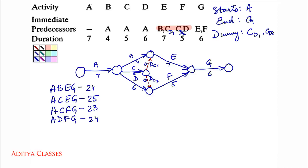Now, which one is the critical path? This is the critical one: A, C, E, G with duration 25. We need to represent it by double lines. If you wish, you can also make the dummy double-dashed.